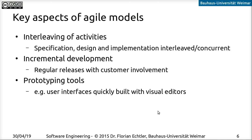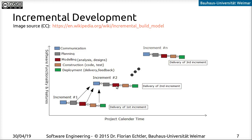These three aspects are the most central things all agile methods share. Probably the most important is the interleaving of activities. Looking at this diagram again: the actual development and deployment happen at the same time as the communication and planning phases for the second iteration. Immediately after deployment finishes, we already start with the modeling and construction for the next part — so some phases actually happen in parallel.